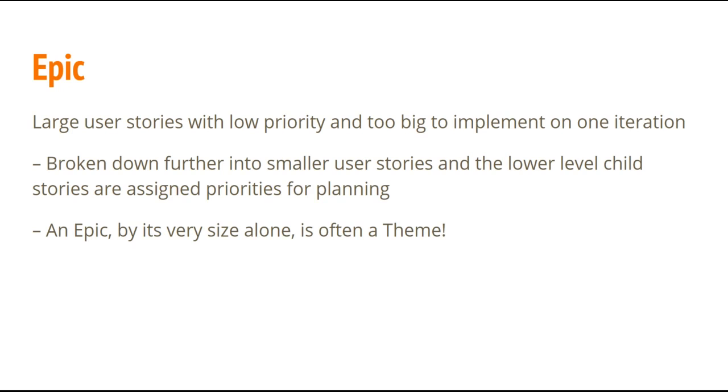Let's move forward to another term that we have in Scrum, which is epic. Well, epic is a large body of work that can be broken down into number of smaller stories, or we also call them issues. Epics often encompass multiple teams on multiple projects and even can be tracked on multiple boards. Epics are almost always delivered over a set of sprints.